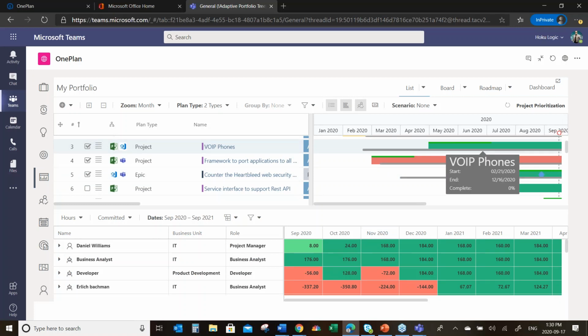So I have another layer of planning that I can do. I can first uncheck projects and say, not now, we don't have the headcount or the team or the key resources we need. Or I can manipulate the timing of a project, say we start this later or potentially start it sooner and so forth. What does that do to my overall resource pool? Where do the hotspots change? And what am I left with?